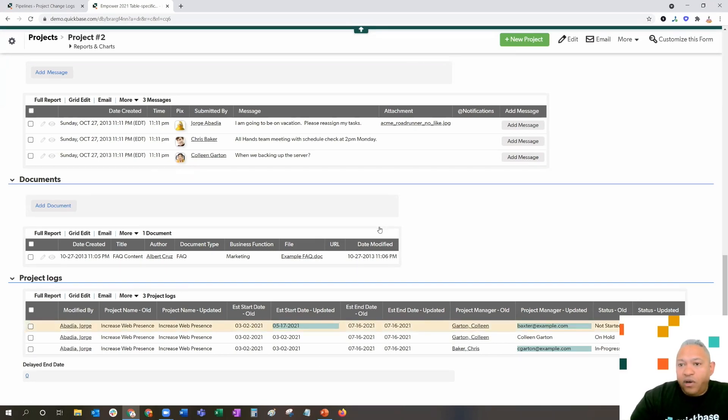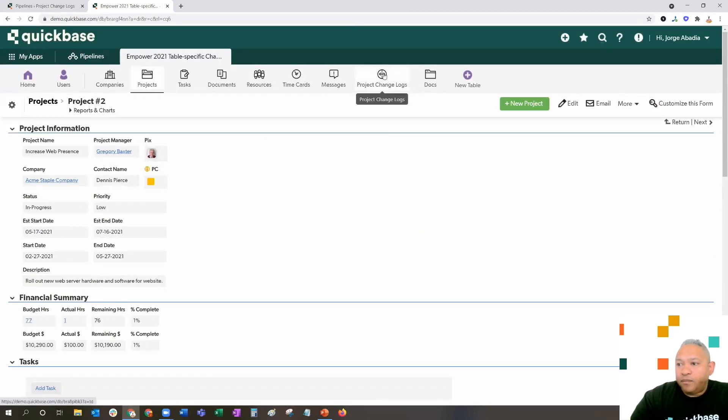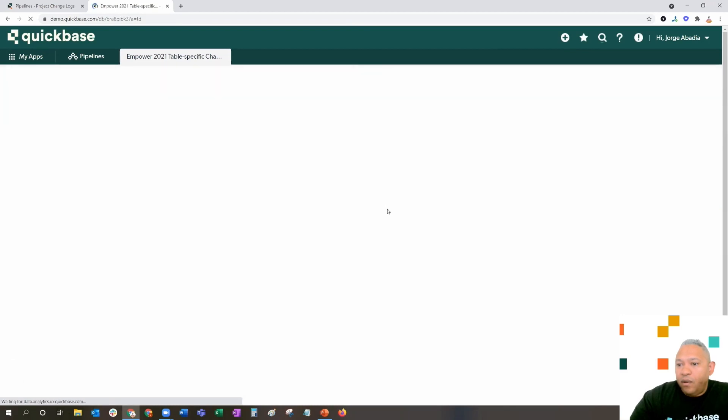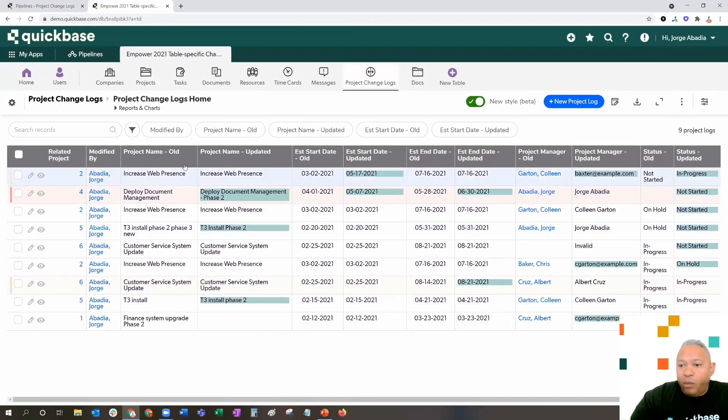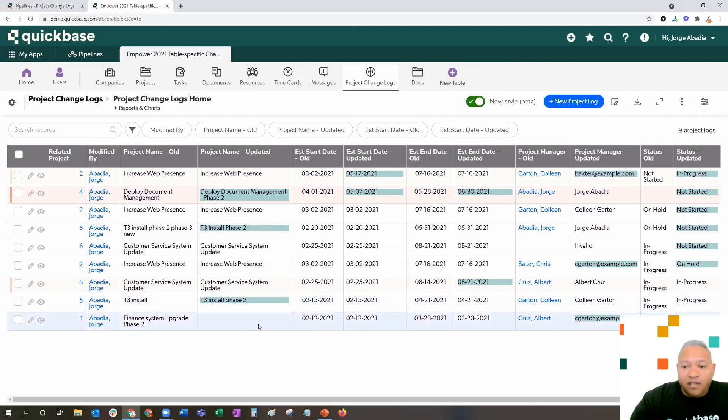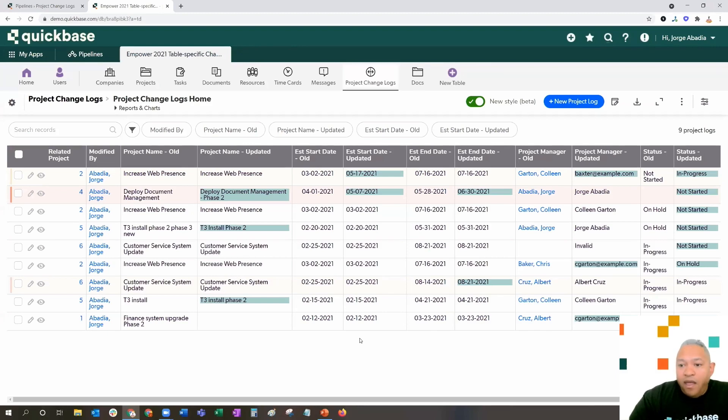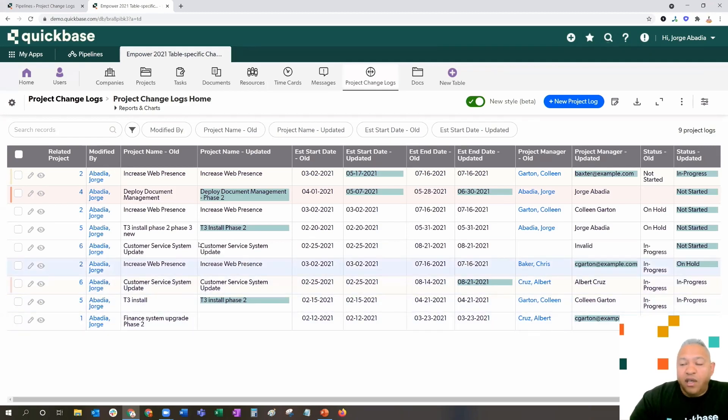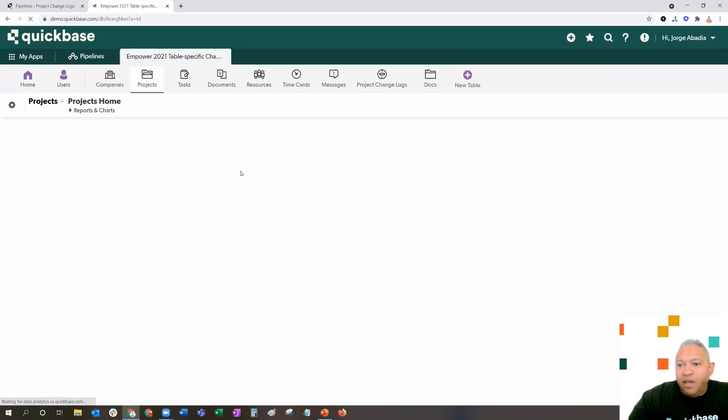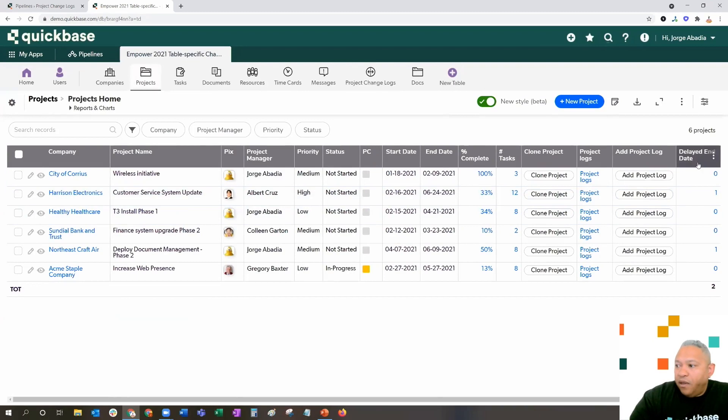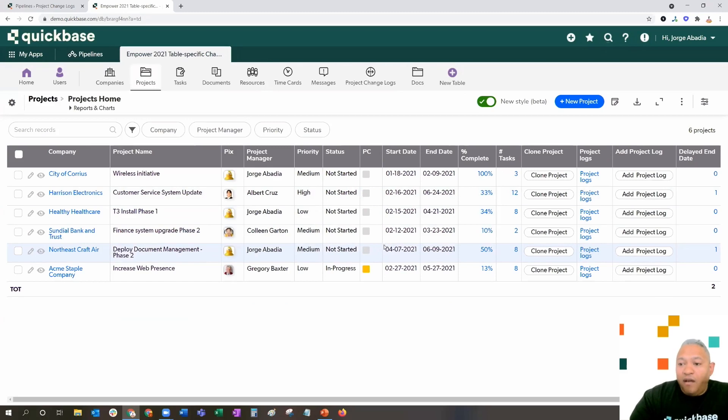Returning to the project logs table. Over time, you can actually report on trends so that if there is a company for which projects are consistently getting delayed, we can take a look at it and potentially have a conversation with the project manager and the customer to see if there's anything that needs to be worked out from a communication or workflow standpoint. Each one of these fields, being an individual record, allows you to create custom reports such as project delays. I created a summary field called delayed end date to let you know how many times potentially a project's been pushed back. If a project's been pushed back consistently, it may be a sign of a larger issue.